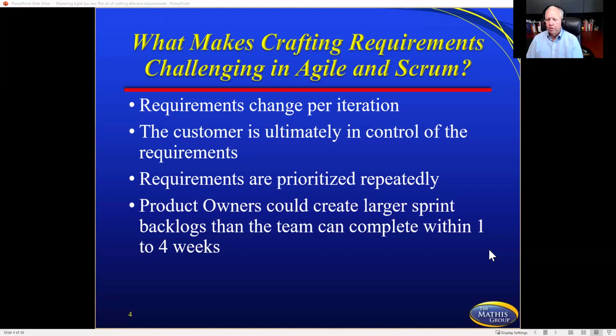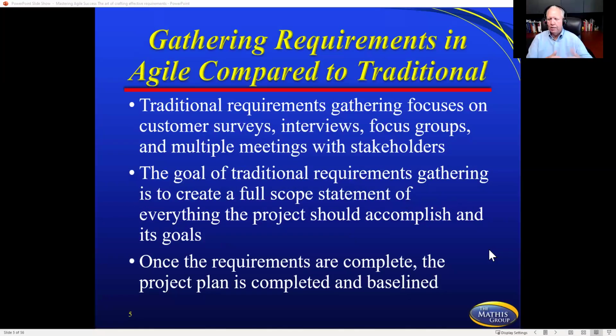People are wanting to talk about change. If you're running a three-month sprint, as one group was doing, you're going to have change orders in that 3 months because it's so long. The goal, remember, of Agile is to do something fast, do the least amount of functionality possible, and get it to that customer where you can start getting the feedback.